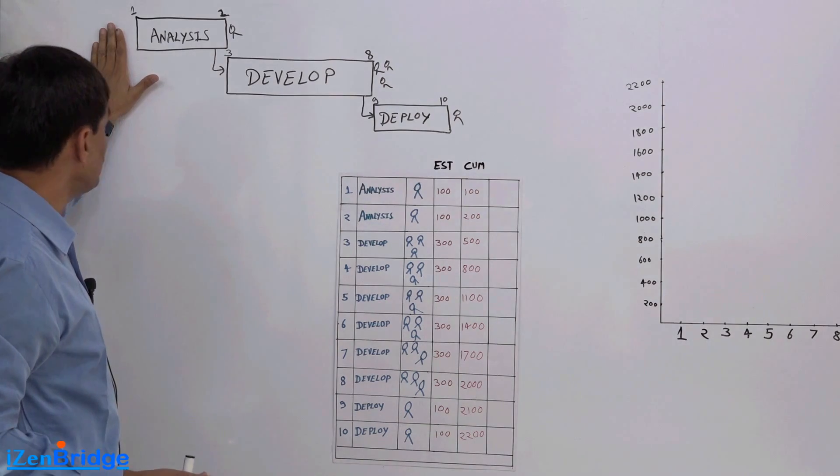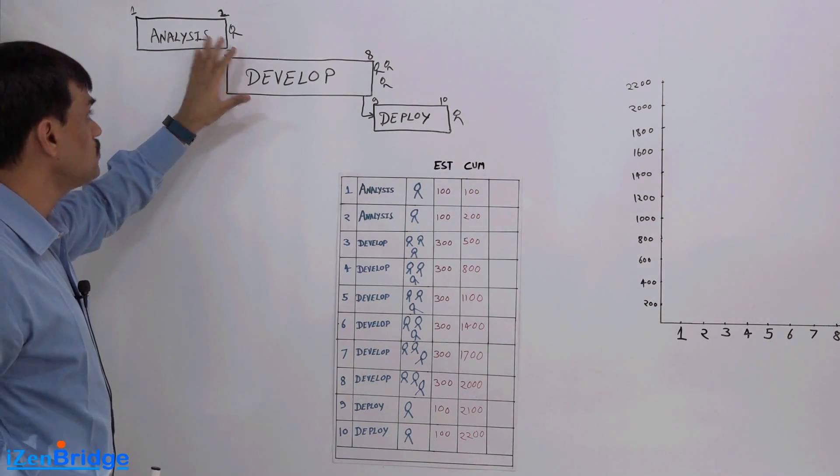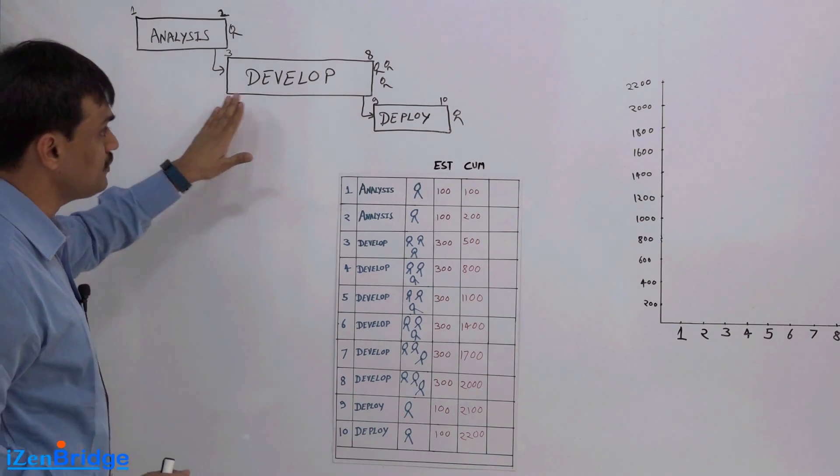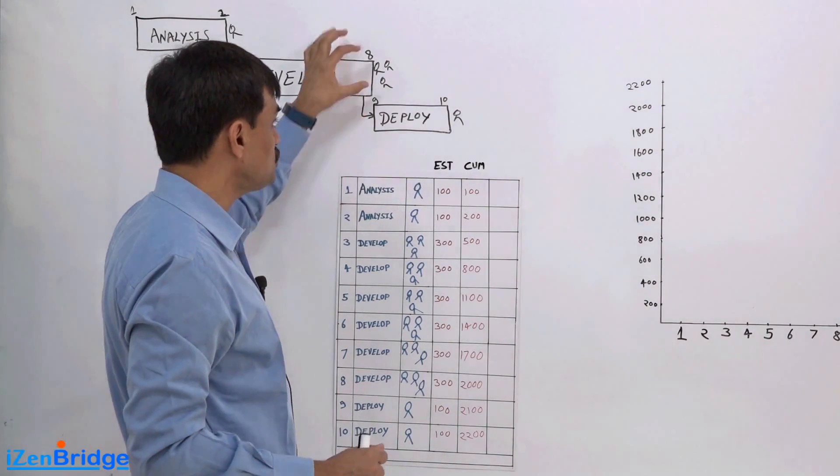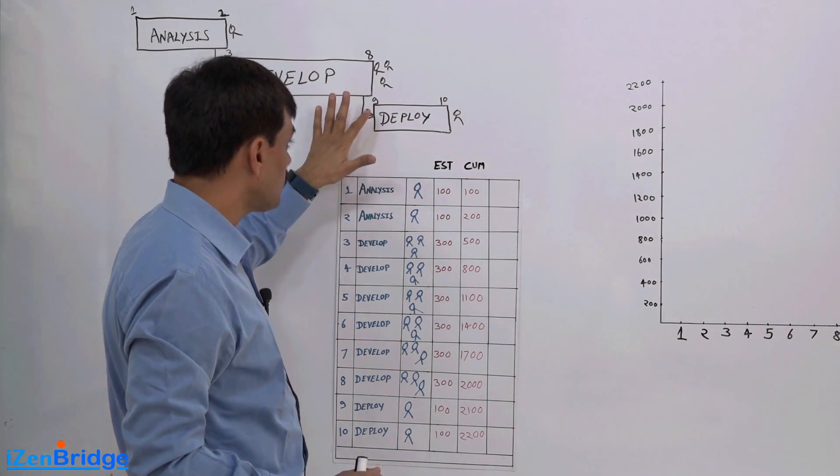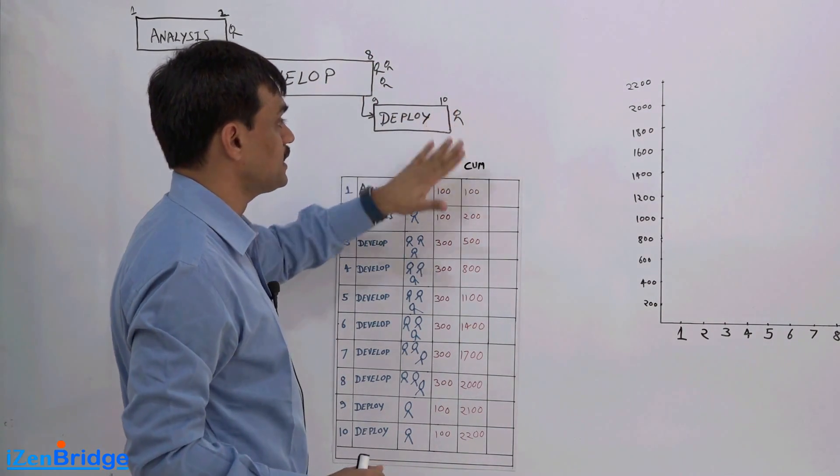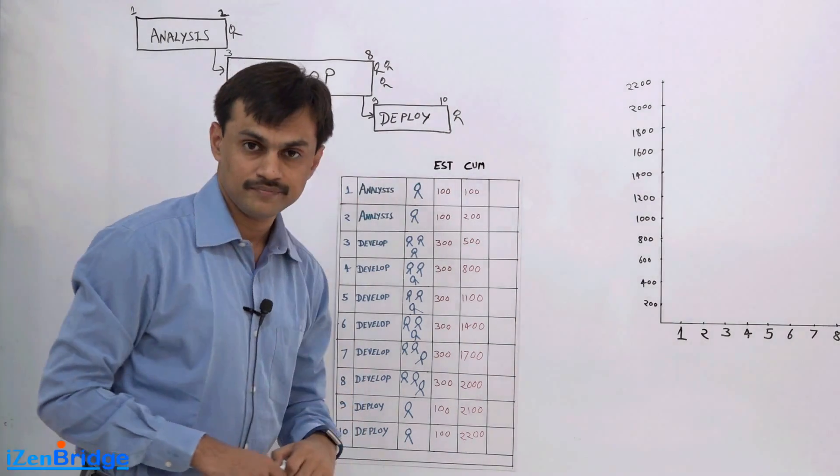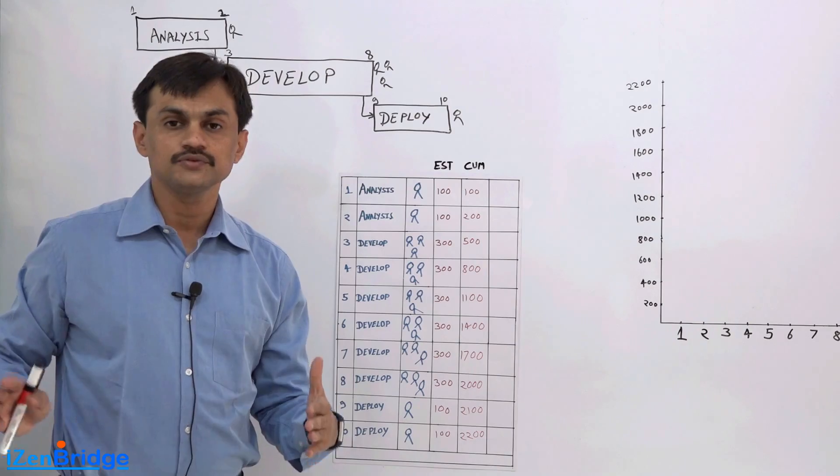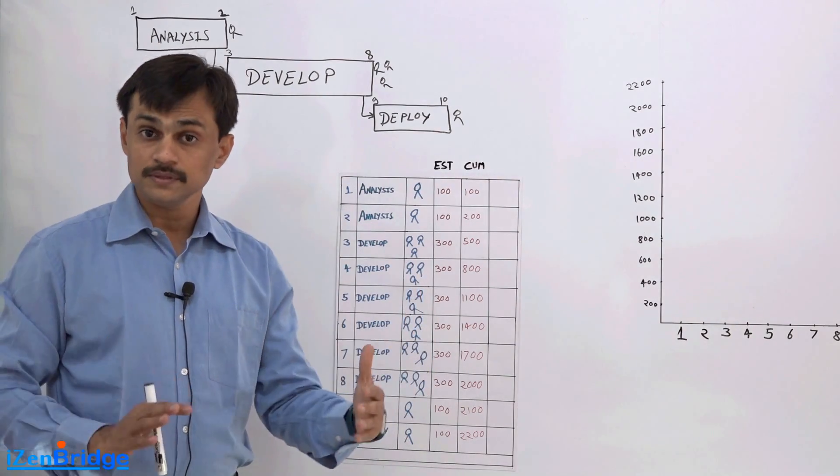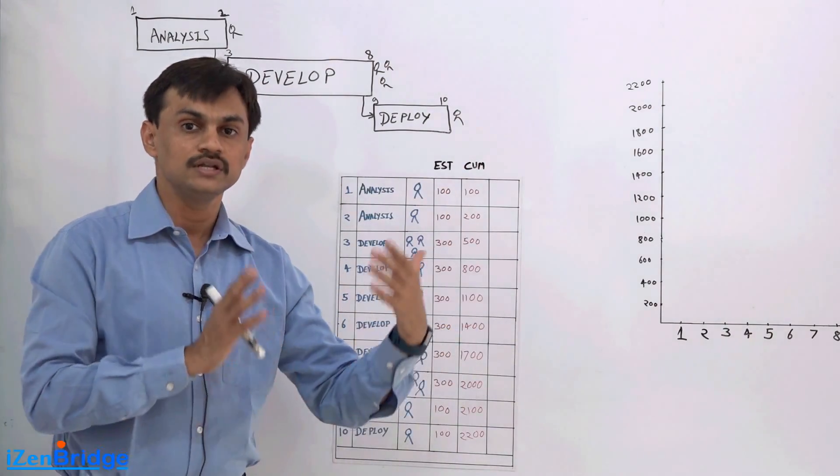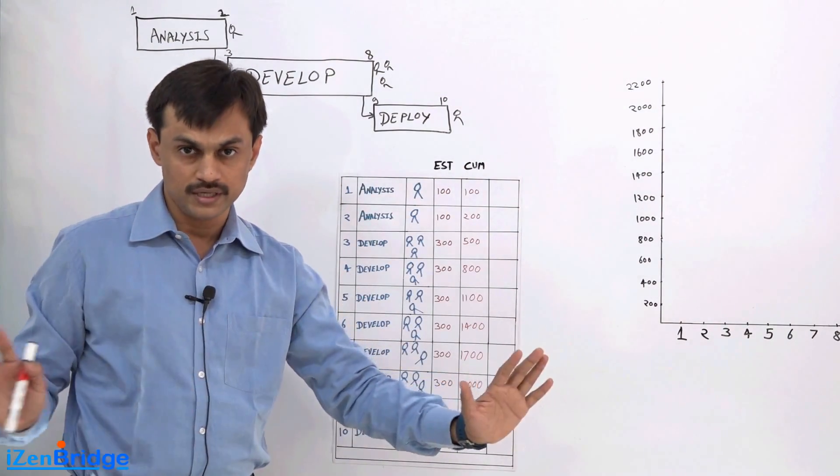I'm starting it on day 1 finishing the analysis on day 2 with one person working on it, then I'm starting development on day 3 and finishing it on day 8 with 3 people working on it, and I'm starting the deployment on day 9 and finishing on day 10 with 1 person working on it.